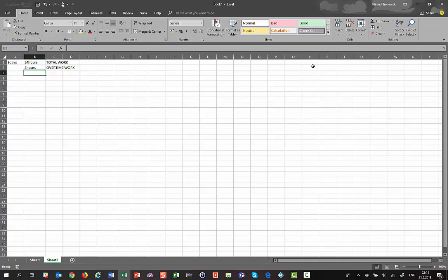Now, let's first calculate duration. Microsoft Project will say 24 hours is total work. Overtime work is 8 hours. It means that 24 minus 8 is 16 hours. 16 hours will be divided by 8 hours per day, which is normal work.